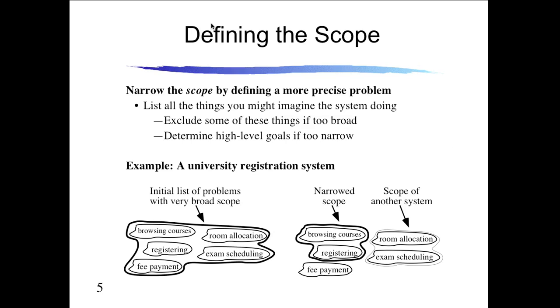And then you run into the problem of, we charged you $10,000 for the system, but you're asking for more features, but they're in the requirement spec, so you have to give them to me, but it's going to cost me more than $10,000 to make all this stuff. So usually a requirements doc is very closely tied to the payment system, to what it is you're actually building, what you're supposed to get paid for, what you're going to validate and verify at the end of the project.